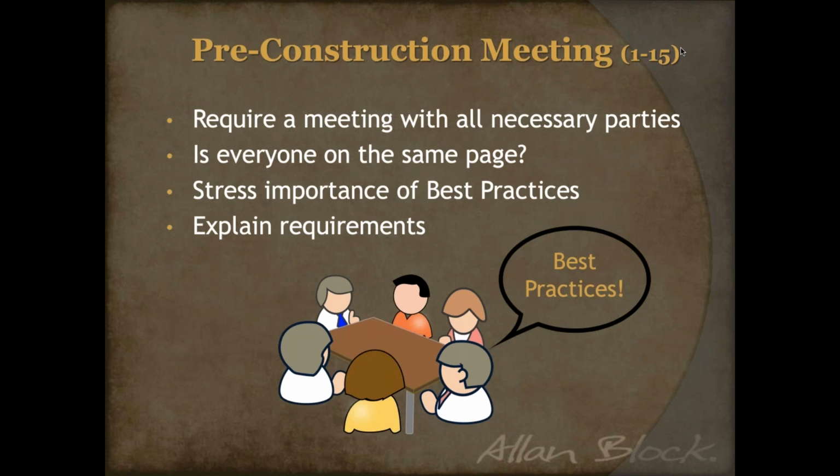Another great person to have at this meeting would be your Allan Block supplier representative or the representative from Allan Block, because they'll be able to help you facilitate the meeting, answer any questions that anyone has, and they've always got a good idea of best practices as well. And so with this meeting, we really try to make sure that site civil, who's controlling the design of the wall, has this as an action item to have that pre-construction meeting. It's going to make sure that everyone who might interact with the wall is on the same page and they understand the best practices that need to be used on the project.